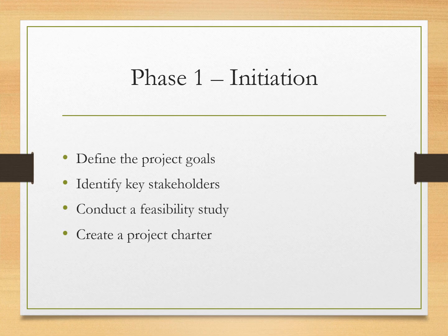Phase 1 is initiation. This is where the project begins. First, you define the main goals. What are you trying to achieve and why? Next, you identify the stakeholders. These are the people who will be affected by the project or have a say in it. Then, a feasibility study helps you check if the project is realistic based on resources, time, and expected results. Finally, a project charter is created, a document that formally authorises the project and gives the project manager the authority to use resources.